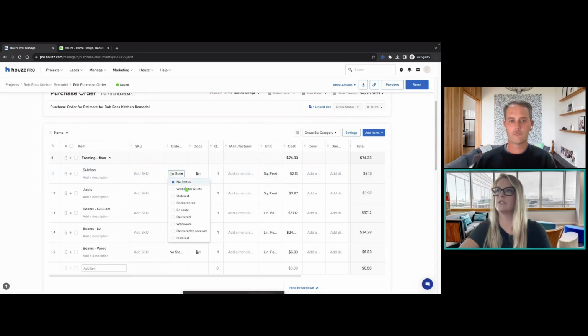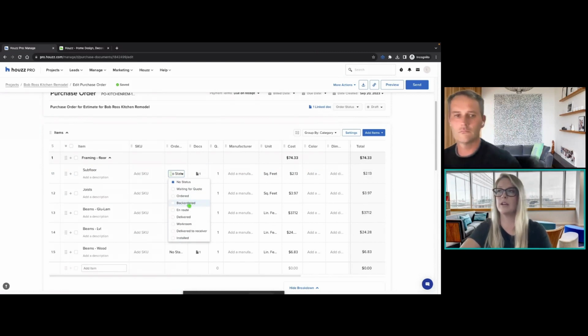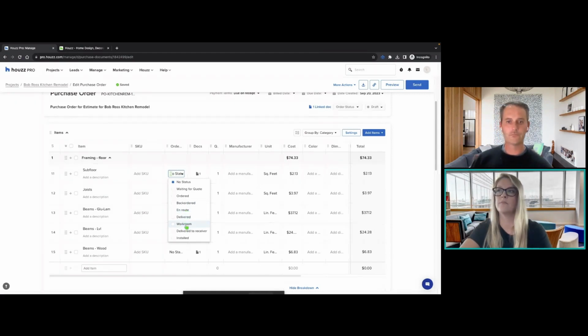Another great thing here is the status. You can adjust these. So is it you're waiting for a quote from them? It's ordered, it's back ordered, which I know is a common occurrence right now with the pipeline of ordering products. It's en route, it's delivered. And I would say delivered is actually like delivered to the homeowner. So sent to the homeowner's address. Maybe it was delivered to your workroom or it was delivered to the receiver. So that could be, for example, your warehouse, or maybe it went to the vendor and you're going to go pick it up, or it was installed. So you have the ability to adjust these as well.